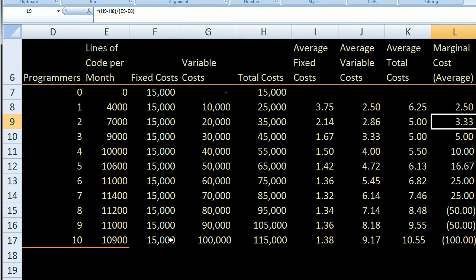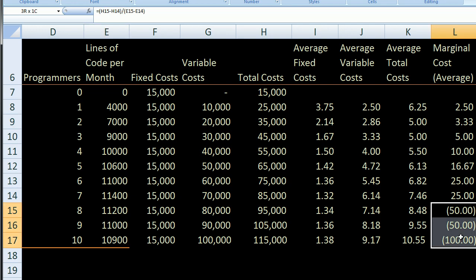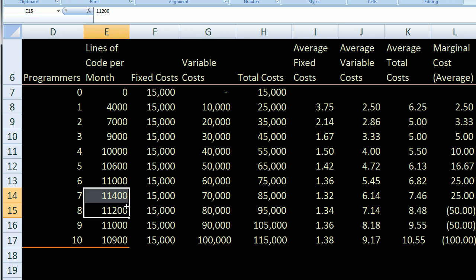Something very interesting happens: we actually get a negative marginal cost. This doesn't mean we're receiving money for writing more code — it means that as we spend more money, we're actually killing lines of code. At some point, too many people on one project team actually start destroying each other's productivity. You can see it in the numbers: with seven people, we write 11,400 lines of code, but the eighth person, due to coordination overhead, reduces everyone's productivity so that the team only produces 11,200 lines. That's why you get a negative marginal cost — by spending more dollars, you're actually destroying some of what you're trying to produce. This spreadsheet exercise gives you a real sense of how a firm's cost structure actually works.